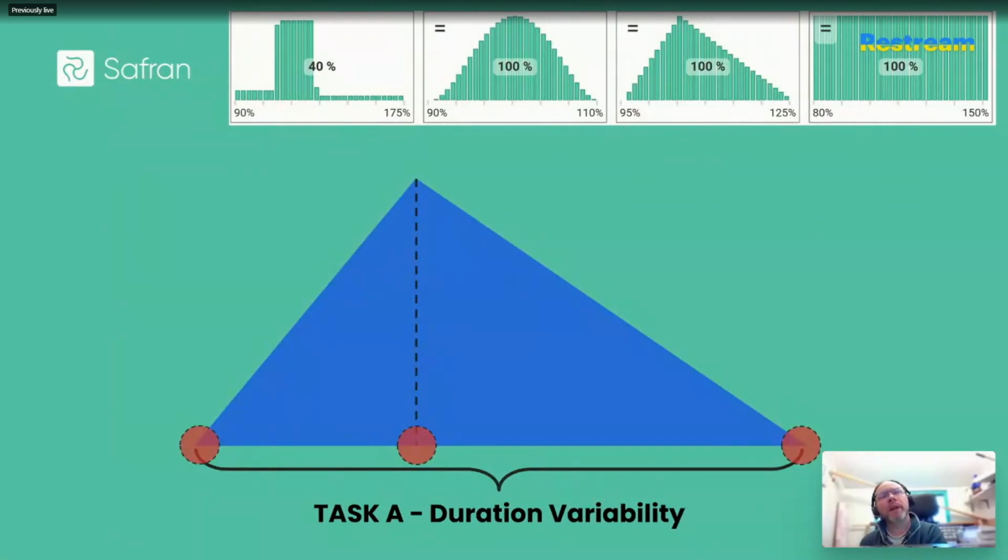But what many people maybe forget in their haste to produce a risk model are two key aspects, both of which are temporal in nature. One, what stage in the project lifecycle are you at in terms of understanding your scope, etc.? And two, does your risk model already have plausible risk events added or likely to add many more in the future?